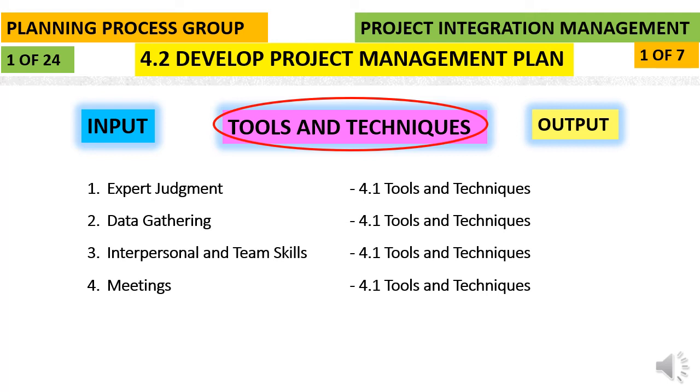So the project kickoff meeting is usually associated with the end of planning and start of executing. The purpose of this meeting is to communicate the objective of the project, gain the commitment of the team for the project, and explain the roles and responsibilities of each stakeholder. The kickoff meeting can occur at different points of time depending on the project characteristics.